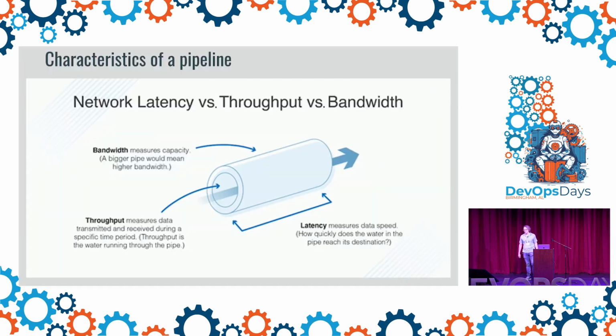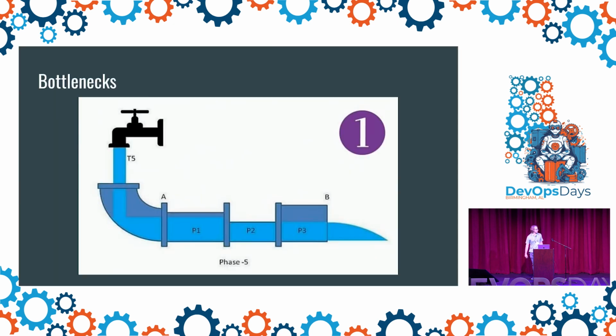All right, so here we have a nice visualization of the relationship between throughput, capacity, and latency. And essentially your throughput is how many capacities can I push through the latency time period at a time, right? So let's say you have 5 issues that you could work simultaneously. How many of those 5 issue increments do we get through in our time period? Most of the time we look at 2 weeks. Some companies do every week. At Fleetio, the mobile team produces once a week, and that's our latency period.